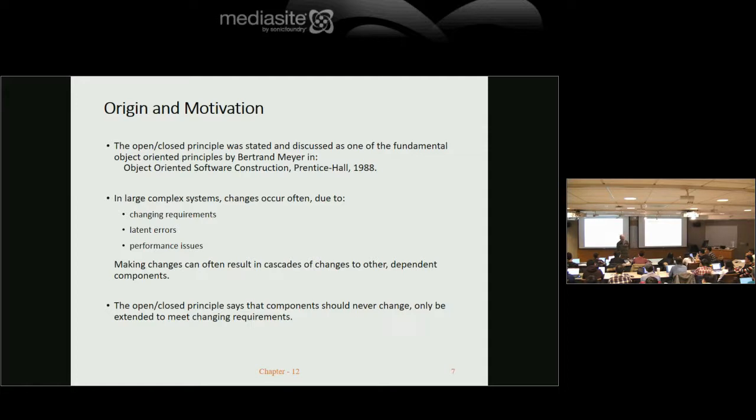This product will not work for us unless it does this thing that didn't get into our bid package. And the program manager will say, well, there's two ways we can handle that. One is that we can reevaluate our cost and submit a change request for cost and schedule.